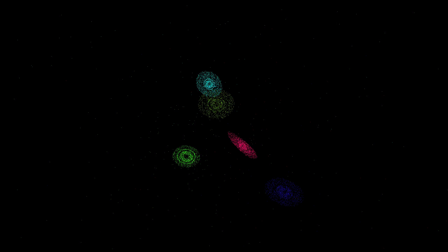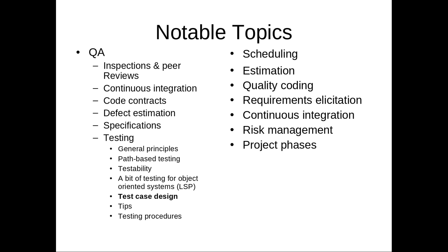You find it post-deployment, and guess what? The end user might have to redo some of their work. And that's no fun for anyone. So when we're dealing with agile development, these phases are still there. They're just at a smaller level, and in some unfortunate cases, they're compressed. This same phenomenon tends to go on. Sometimes you even find one sprint leaving defects to be discovered in another.